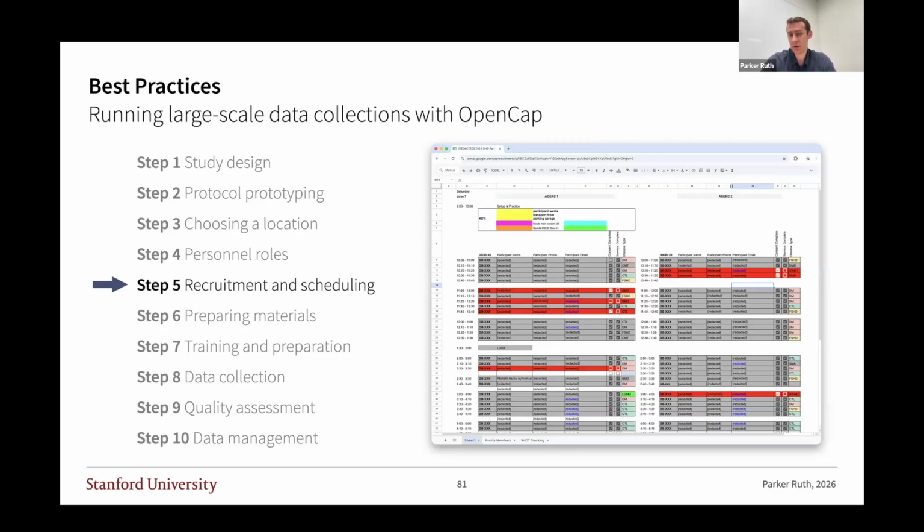On the other hand, you have to also prepare for the unexpected. So we recommend scheduling some breaks in the schedule where you can either allow your study staff to just take a break and get something to eat or stand up and stretch. And also, if you're running behind schedule, it's a chance to catch up again. We've also found, as we've done these data collections over the course of multiple years, every year it goes more and more smoothly. So you might be surprised just how efficiently you can collect data this way.